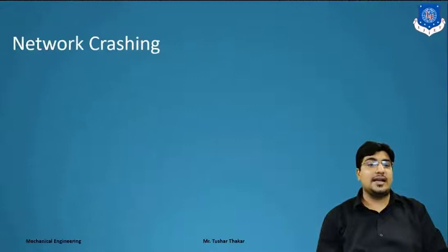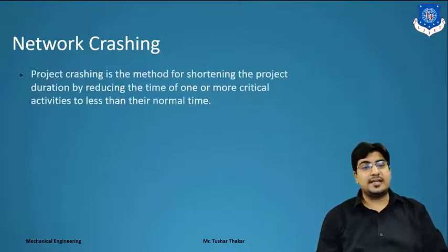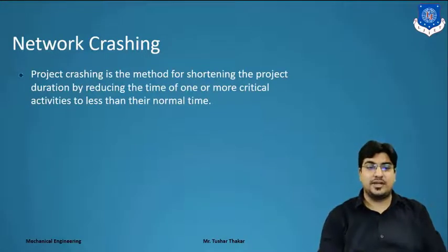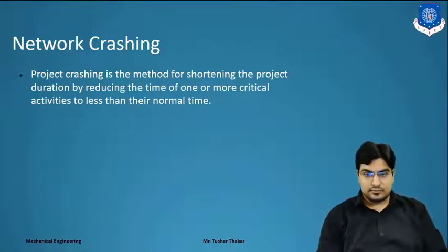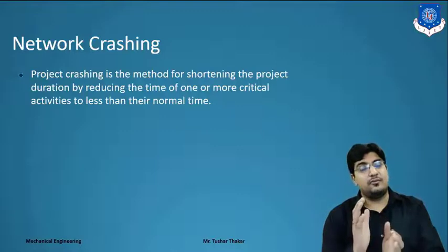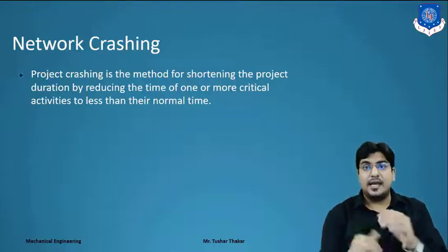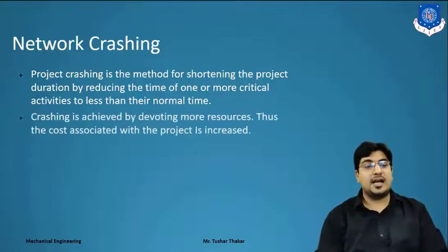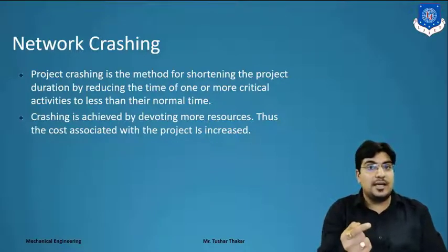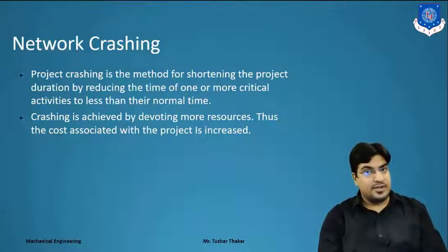So what is network crashing? Network crashing is simply a shortening of the project duration by reducing the time of one or more critical activities to less than their normal time. So we have to shorten the project by applying crashing. Next, crashing is achieved by devoting more resources. Thus the cost associated with the project is increased. Here we invest much more money for reduction in the project.